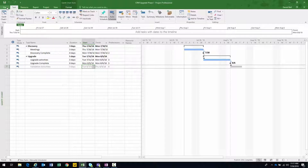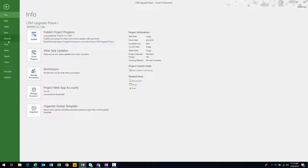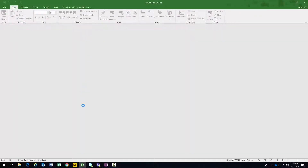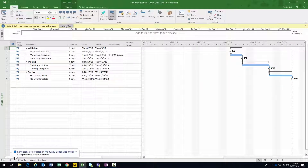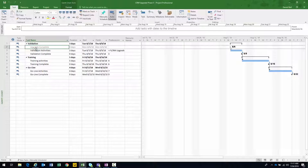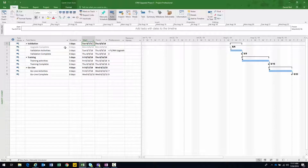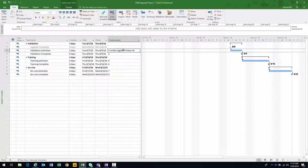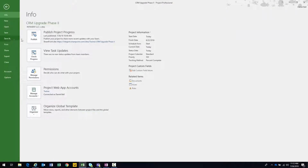So now as I execute this project and people do work, I update the actual work and other data points, and as dates fluctuate this is going to impact my phase two project. Let's go ahead and check phase one in and open phase two. There's the predecessor — upgrade complete — it's a little bit grayed out to show it's a predecessor from another project. The date now reflects reality: it's going to be 8/7. The whole project timeline is reflecting reality like we wanted. The predecessor is upgrade phase one, row six. Go ahead and publish it.